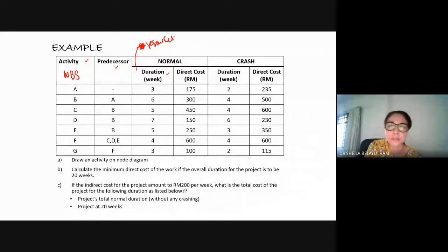Okay, so even though you work for construction, at the office, at the HQ, you need to know how feasible it is to complete a certain activity. So you need to look at the activity, the quantity of work that is required to complete, the resource in hand, then you can come up with the resource that you estimated and the duration that you can complete within. So it is not simply place a number and push it onto the contractor.